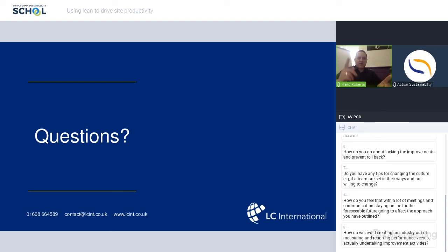At the end of each phase, we have a lessons learned session where we make sure all these 5Cs or improvement solutions are captured and documented effectively. Then at the start of each phase or project, we dust these things off, bring them to the surface, and make sure we're locking that learning in on all future phases.